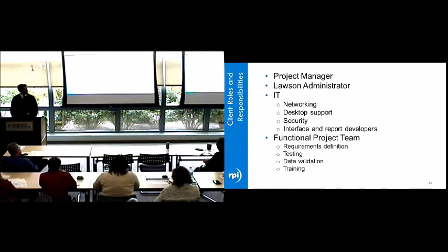From your IT group, I mean, outside of your ERP administration team, look at getting your networking group involved, since they do need to make sure you have network connectivity to the cloud environment. Desktop support, because when moving to Lawson 10, there's a change in browser compatibility, and we've seen there are things at the desktop level that you do want to look into and validate, that the various desktop configurations in your organization are going to offer good performance and good compatibility with Lawson 10.